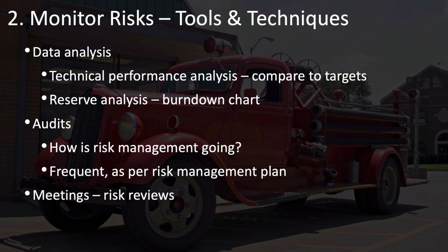The next main tool and technique is audits. This is simply an assessment of how well your risk management processes are performing. These should be held frequently. How frequently and how they're held and who should be there should be defined in your risk management plan.